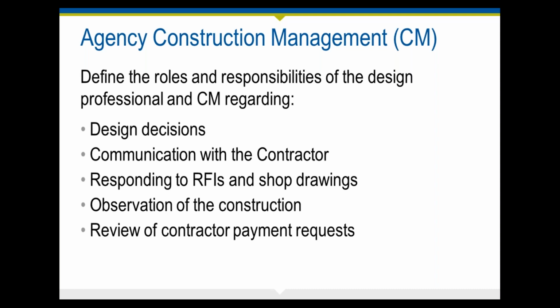It is especially important that these documents define which entity, is it going to be the design professional or the construction manager, has the final authority regarding issues such as design decisions, interpretation of the documents, responses to RFIs during the construction phase, review of shop drawings, observation of the construction, contractor payment requests, and communication with the contractor.